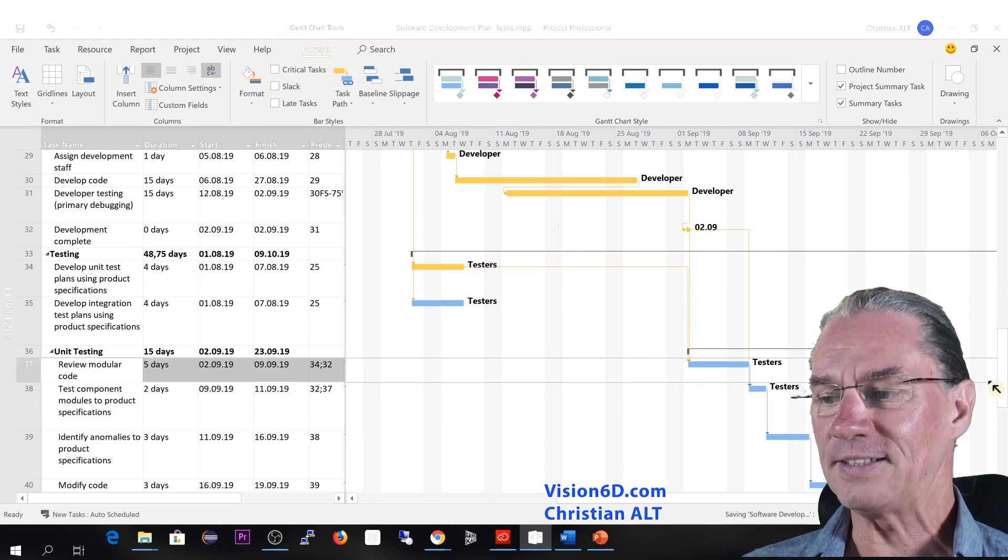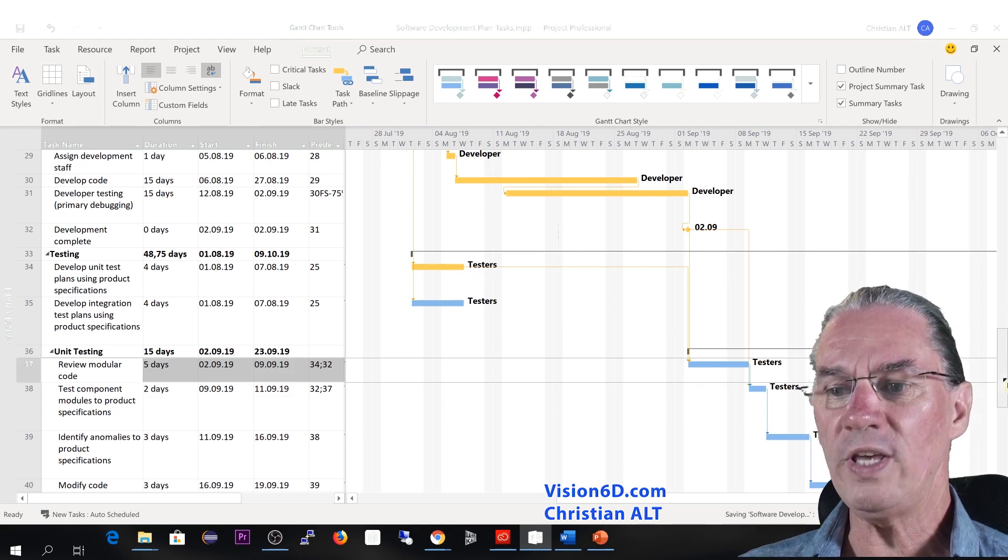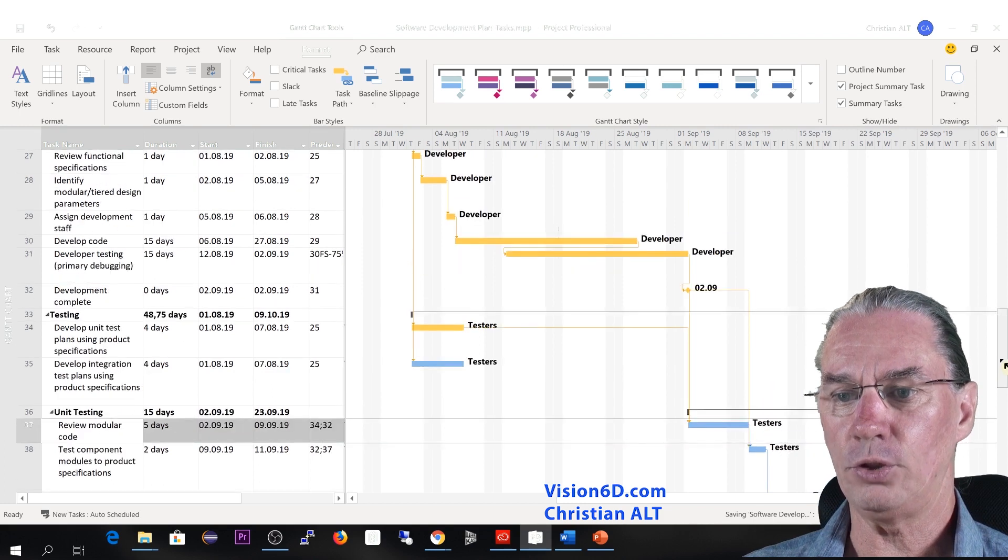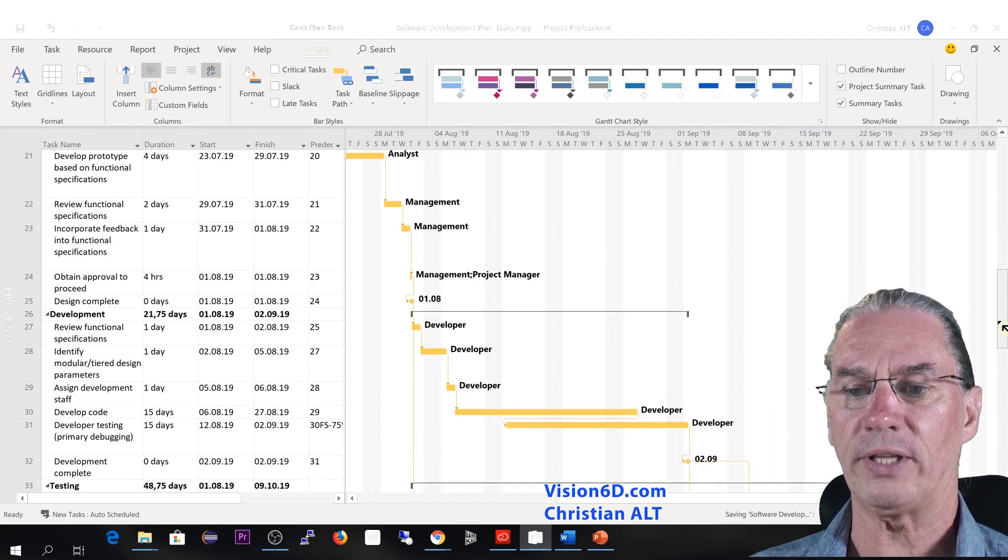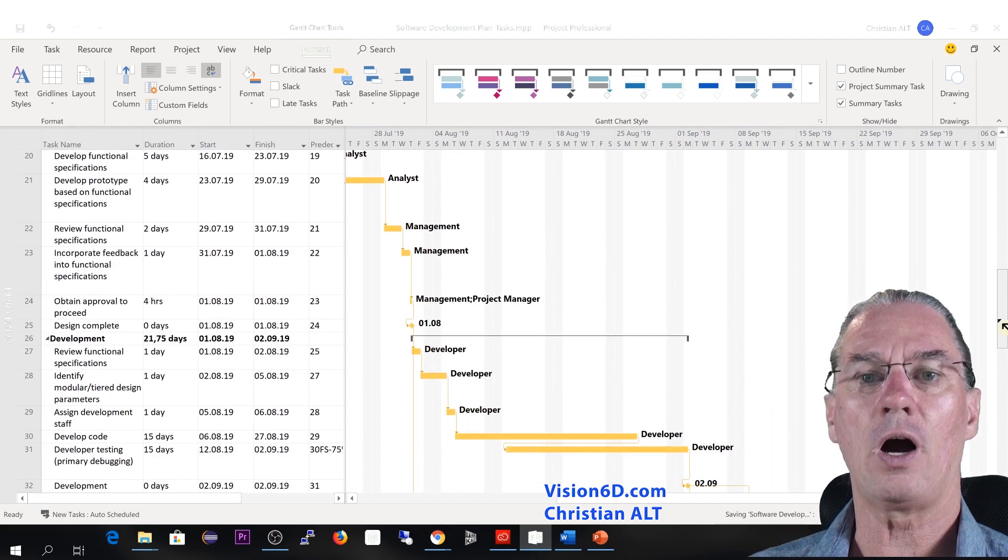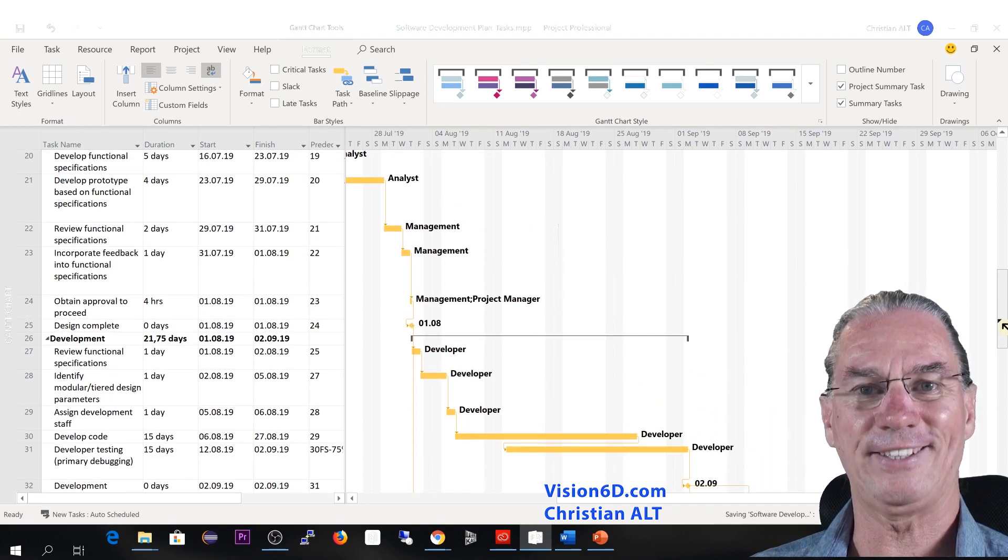We see here that in yellow have come all the predecessors of the task which is number 37 here. And if I go up here, you will see that all the predecessors are highlighted.